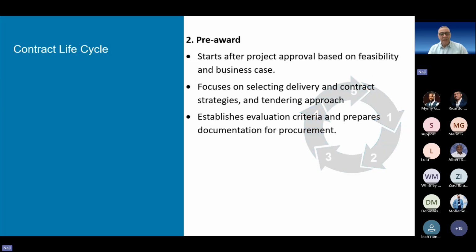Again, in brief, the second step is pre-award. We did not ask contractors to sign; it is pre-signing, pre-award. So again, you read the business case and you determine which delivery method, one of the several methods that you saw yesterday. Is it BOT, is it contracting, is it daily labor, contractor at risk? Which one are you heading toward? So this is the pre-award phase.